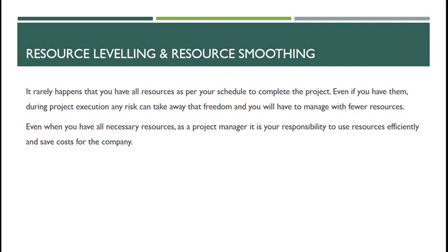The actual hire of the crane was on a daily basis, so you can imagine you've paid all that money for a crane and a crane driver and probably only used it for maybe half an hour of an 8-hour shift. So, you know, it's all about managing your resources as effectively and efficiently as possible. And if you had that scenario on every task and every dependency, your project's going to run longer than it should, but it's also going to cost you more as well because you're paying for resource that you're not using.